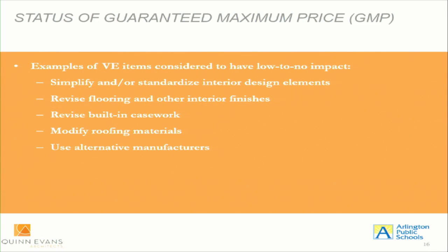So some examples of what we would consider low to no impact are on the screen there, and these are very similar to the things that we accepted at the other projects of Wilson and Fleet. They were looking at simplifying designs, changing materials and finishes, modifications to roofing and using alternative manufacturers.